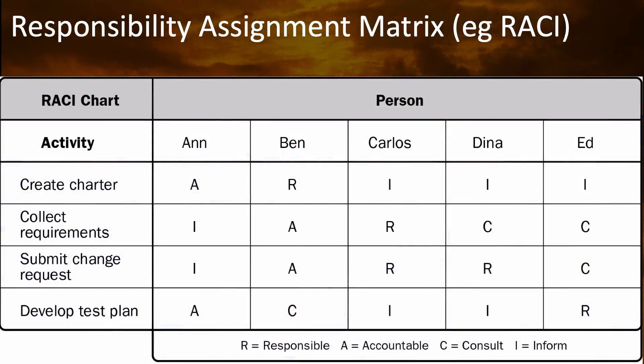Another valuable technique is the Responsibility Assignment Matrix. One type of Responsibility Assignment Matrix is called the RACI chart. RACI stands for Responsible, Accountable, Consulted, and Informed. In a chart like this, you identify the different activities or responsibilities along the side — one row for each one. Then in the different columns, you list the different people that are going to be working on your project and responsible for different parts of it.